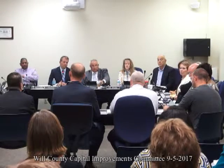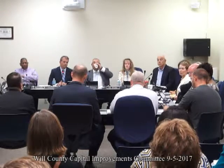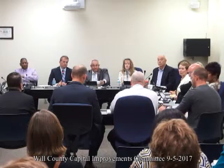And as Jason mentioned, we did receive the bid docs on 8/25 for design release 2. Those are going out tomorrow. We're preparing the notice today to give to Rita that goes in the paper for advertising those packages. Those will be due on 9/28. So those will go out tomorrow.